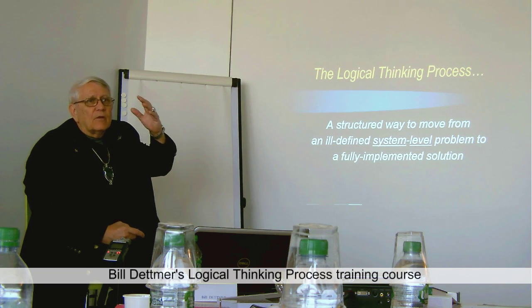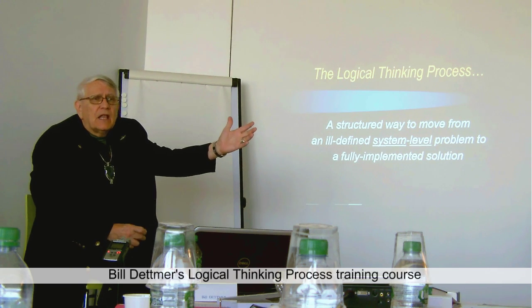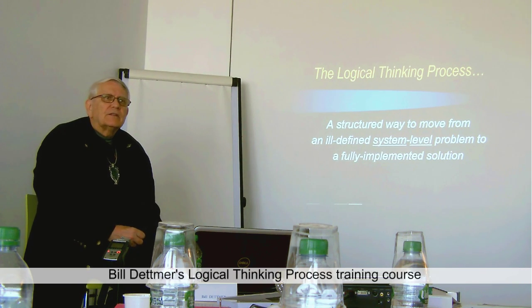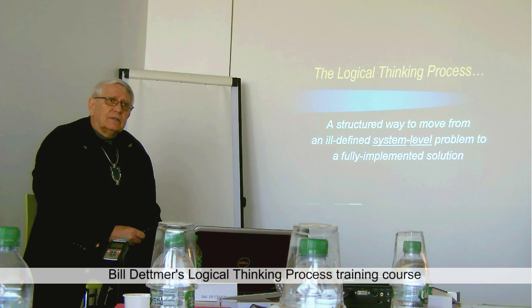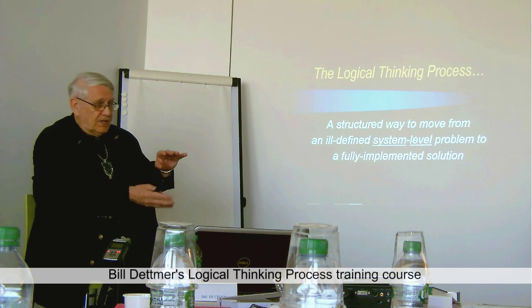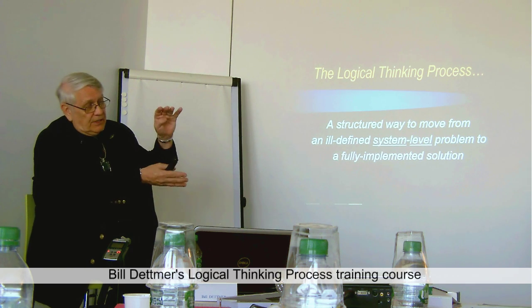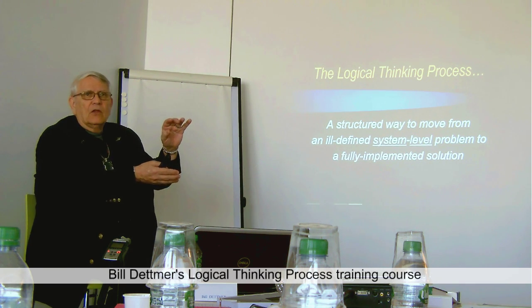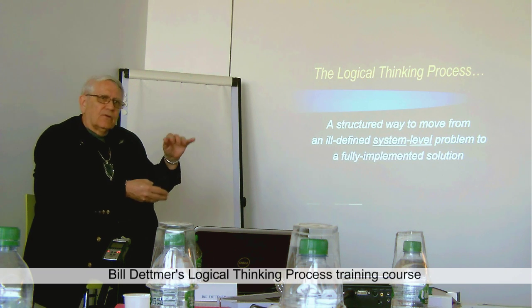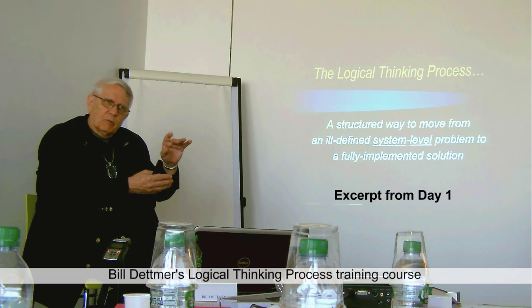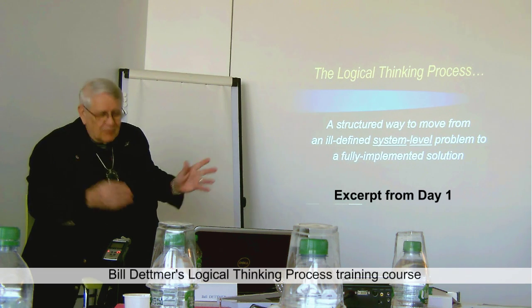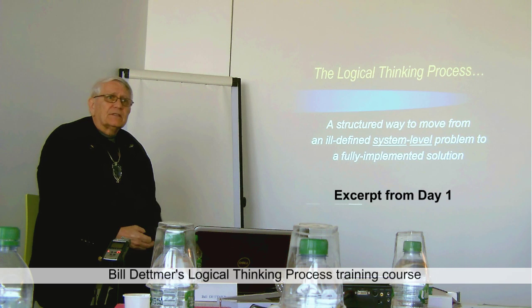So by imposing a time factor on the cause and effect, you get to something that every project manager needs to know, which is schedule duration. It's going to give you a sense for how long the schedule really needs to be, because these 5 steps and the last 5 steps are going to go very quickly. These 3 in the middle are going to take a long time. How long? I don't know. Our best guess is this. Fine. We'll use that as a basis for a 50% time, and we'll put a feeding buffer in there. This is when it comes to the execution.